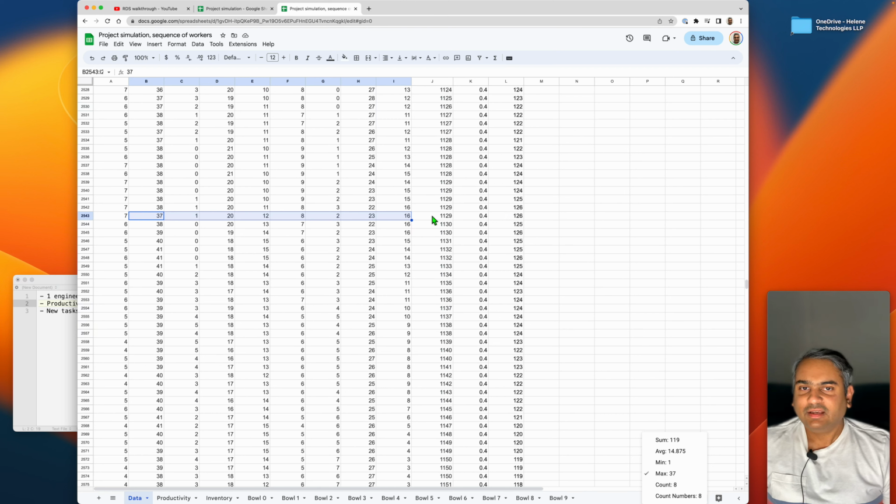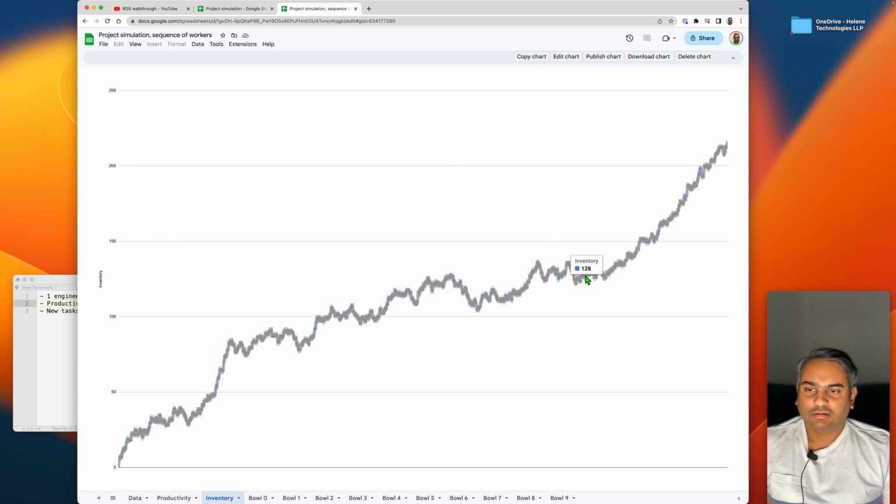Now, in a real team, there is some amount of parallelization. The back-end and the front-end engineer can typically work in parallel. But in this simulation, we are assuming there is no parallelization at all. It's a strict assembly line. The fifth person can start work only after the fourth person has finished work. That's what we are assuming here. And this backlog is exactly why you should prioritize.